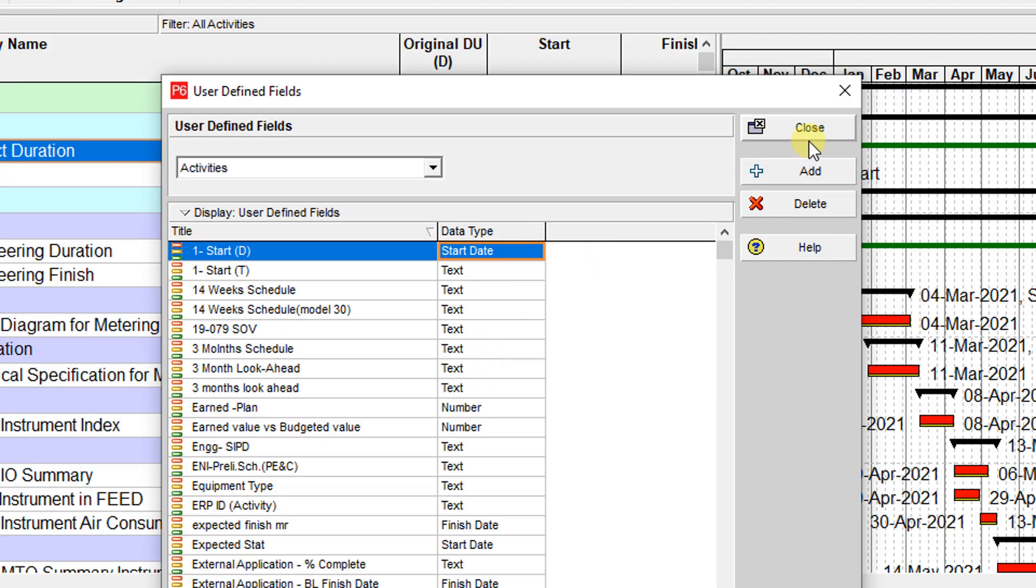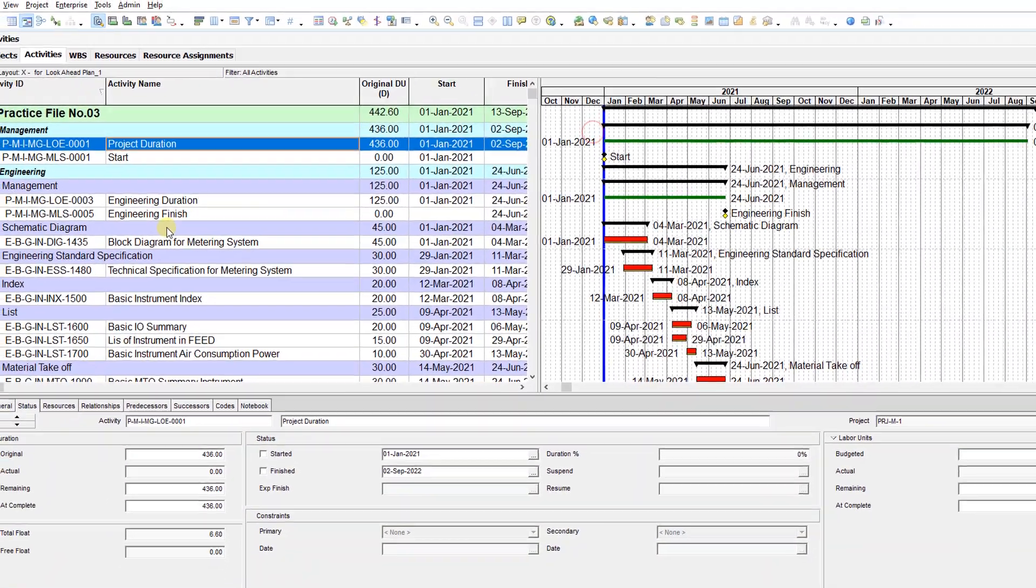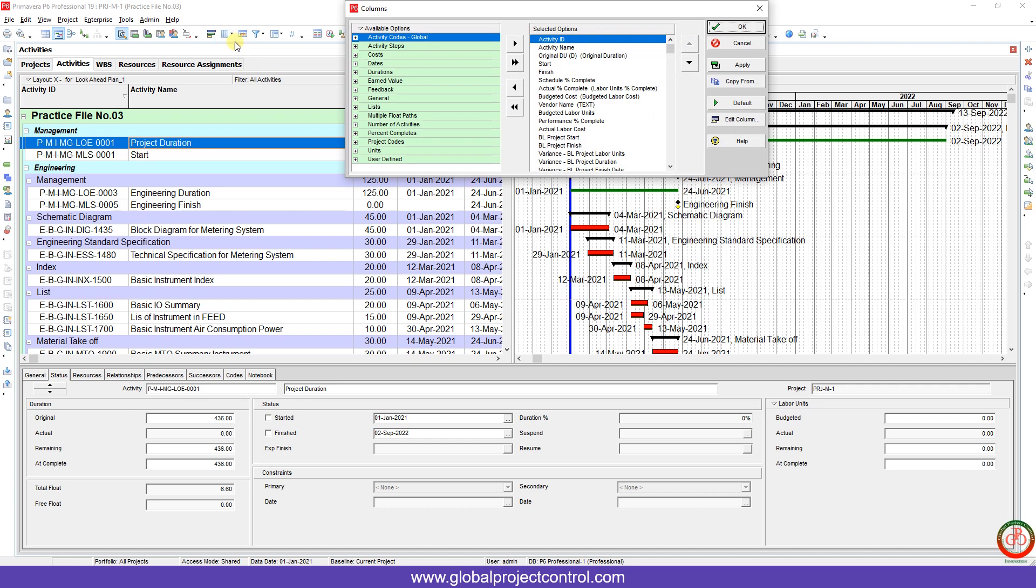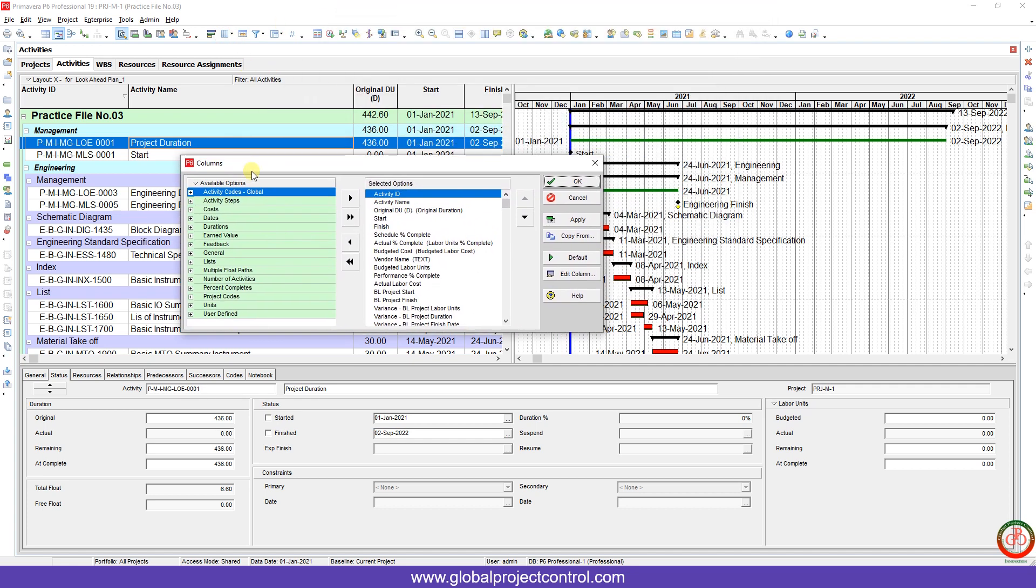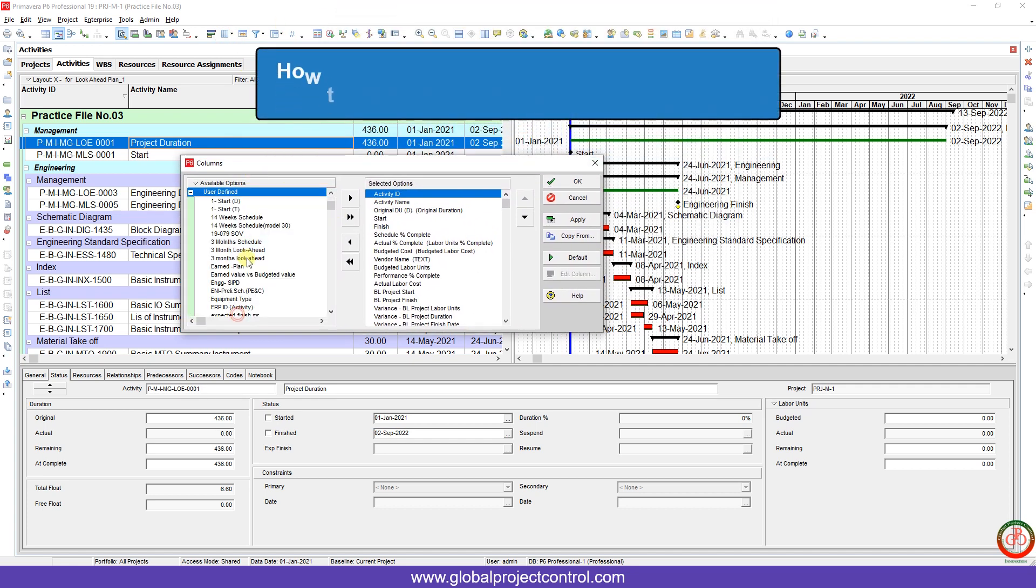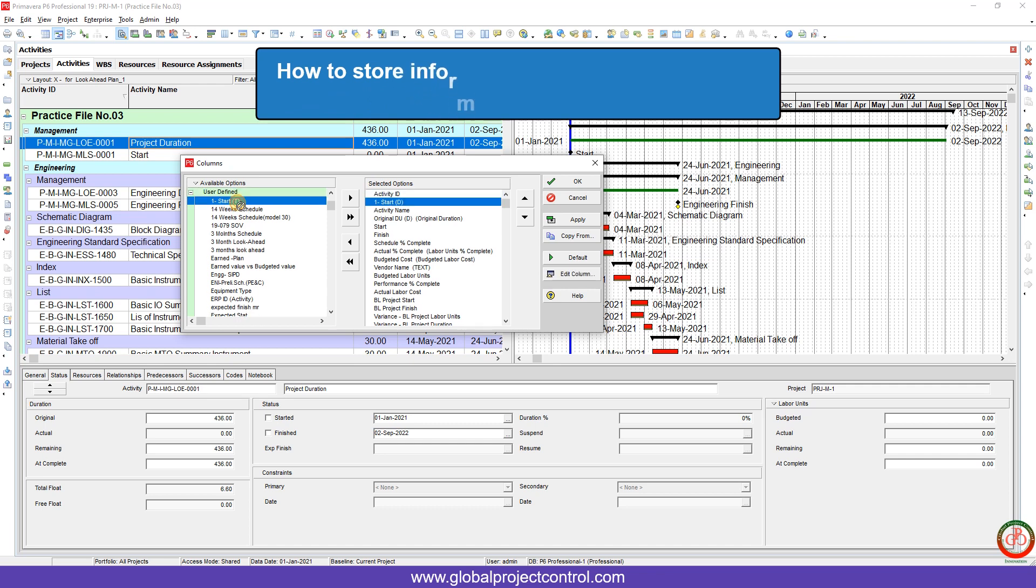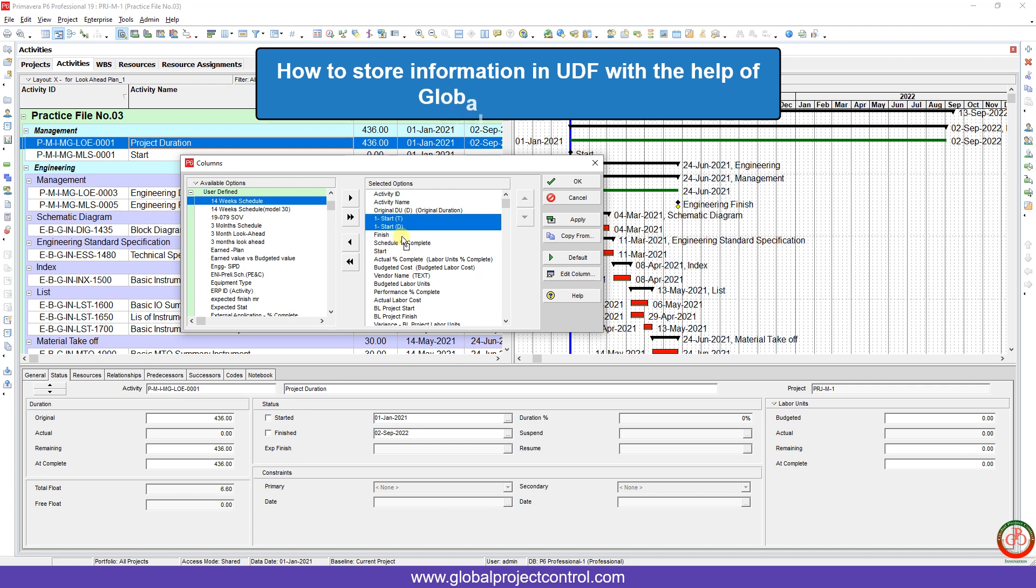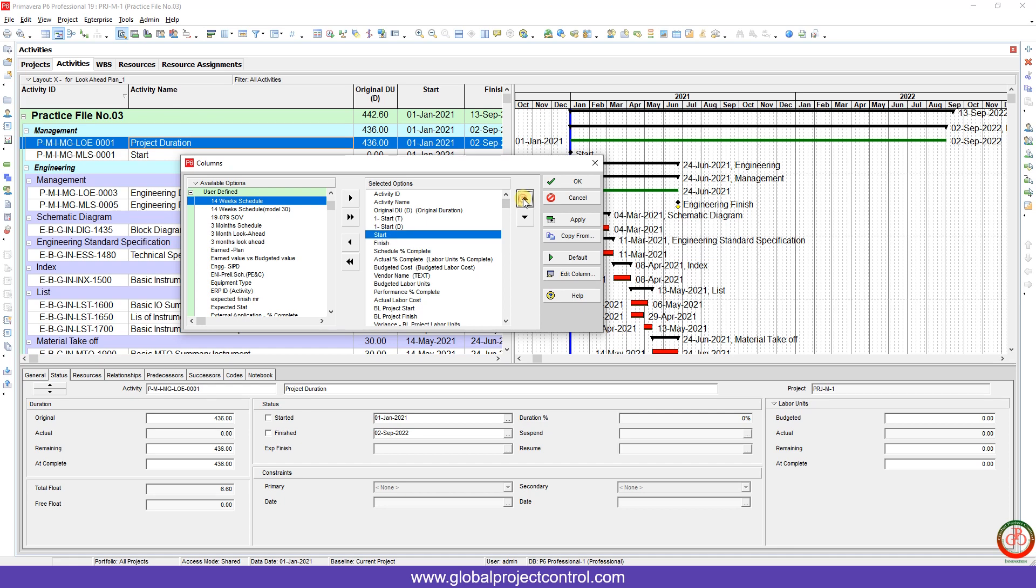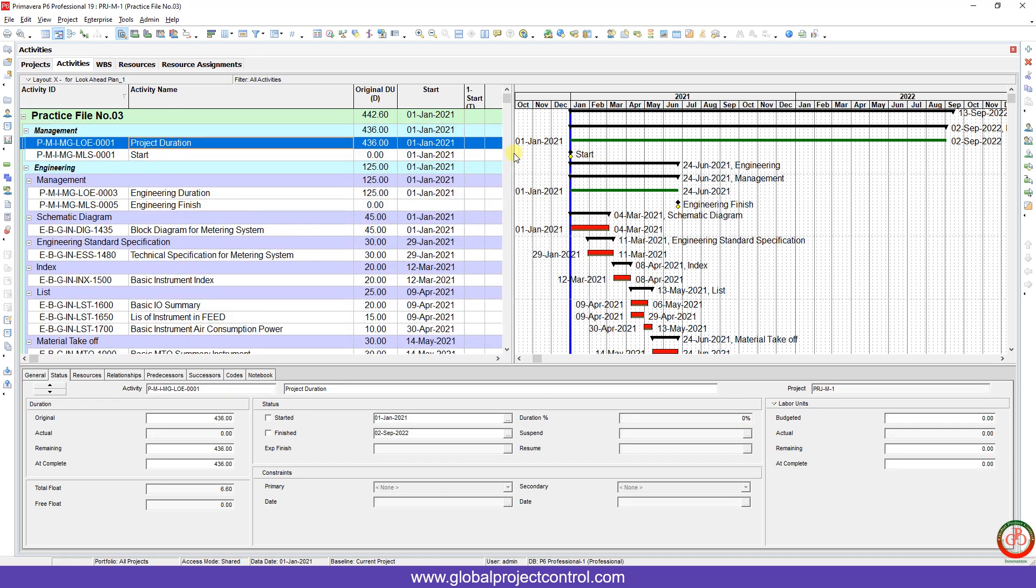Now I want to close it. If you want to store your start date, I go to the columns, then I want to search these two user-defined fields over here. I add them and put them after the start date over here.